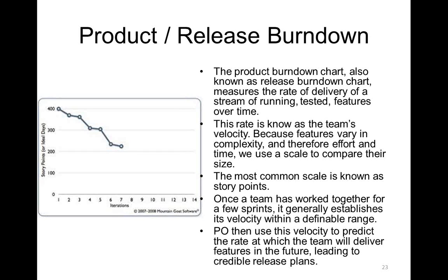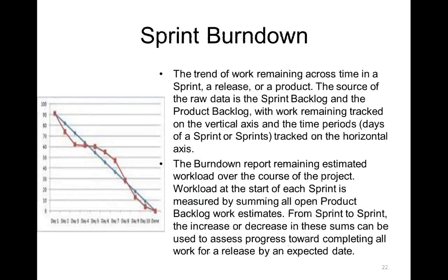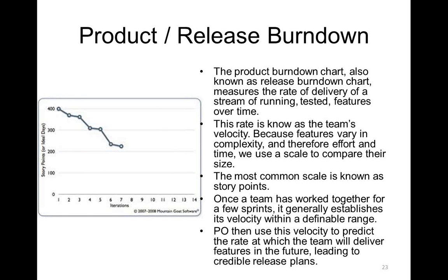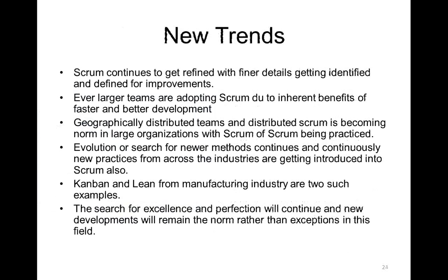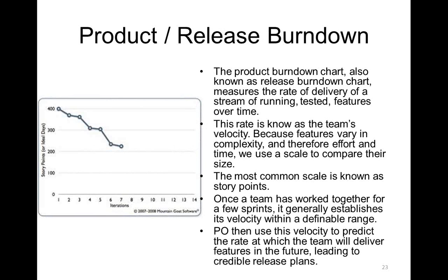So these 400 story points are being tracked on a sprint basis. For each sprint, it shows the progress. Right now, it is showing the progress of 7 sprints. Like in the previous graph, where we were seeing the delivery or schedule being met on a day-to-day basis, here it is watching the schedule being met on a sprint-to-sprint basis. So this is how the progress is made, and sprint after sprint, the deliveries will be made, and finally this tracking is there.